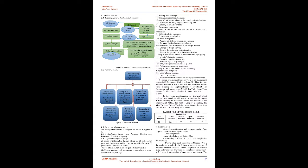R2: Group of risk factors related to the capacity of stakeholders, such as the design and estimate unit, investor, PMU, and the verification unit. If the capacities of these subjects fail to meet the requirements, it will endanger the work's quality, cause death, wrong orders and procedures, delay, and exceed the total investment.